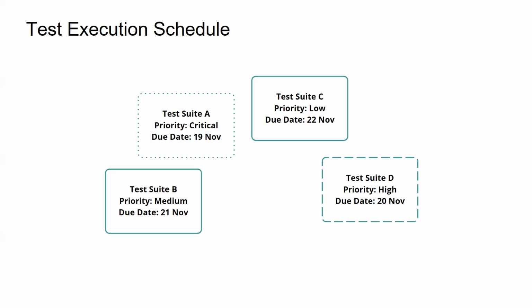Why we prioritize this thing is, in some cases, let's say we have a 6 months project, we are testing it now. When we come to the last 2 months or something like that, we understand, okay, it's not possible for us to complete within this time period, but the client anyway requests us to provide the completion, right? In that situation, we can prioritize these things, and we can conclude that at the end of the 6 month period, we have tested the most critical, high priority testing. We may have to omit the low priority one, but that is fine.